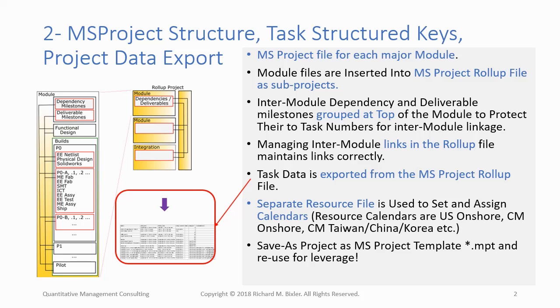Most complex projects have work distributed among several organizations, which may be different companies, and those may also run on different calendars, particularly for planned multi-day holidays like Lunar New Year or Golden Week in Asian companies, or extended time-off periods like Christmas and New Year's in Western companies. It's useful to use calendars reflecting significant work interruptions.